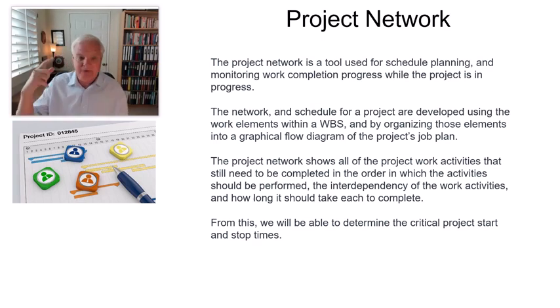So, lessons learned from a project manager standpoint, always look for choke points. Those two coming together is referred to as a choke point from a project standpoint. And those are the areas where we want to make sure that you watch, observe, make sure that you've got good communication, that you've worked any of the issues associated with that area, because those will stop your project dead.